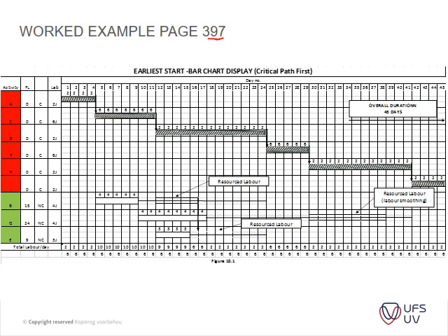Figure 18.1 illustrates a 45 day project with 9 activities, A to I. Activities A, C, D, F, H, and I are all on the critical path, and activities B, G, and E have a float of 15, 24, and 9 days respectively, with a total time period of 45 days.